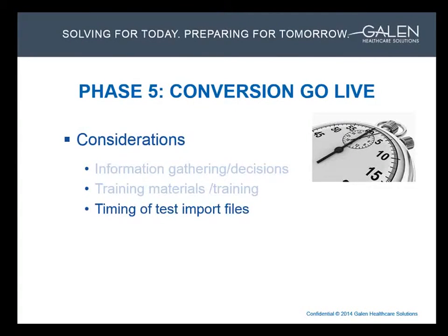So, timing of test import files. When converting data into the test environment, the Galen tech can time how long the imports take, especially with the large files such as results and scanned documents. We typically find that those take quite a bit of time or have the potential to. I will make a quick mention that Galen does have some conversion tools, some already implemented and some in development, that can help expedite this process, but nonetheless, these can take quite a while. So the timing in test is important.